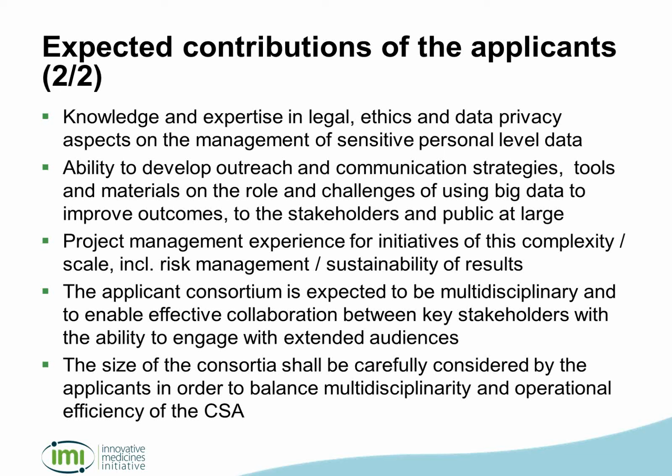Although we think it will be a large number, it shouldn't be too large either, since then it becomes just not practical to operate on a daily basis, and a lot of coordination effort would cost a lot of time. Therefore, we feel, and IMI feels, that the size of the consortia should be carefully balanced, covering all the disciplines against having too many, which would make it too difficult to operate.